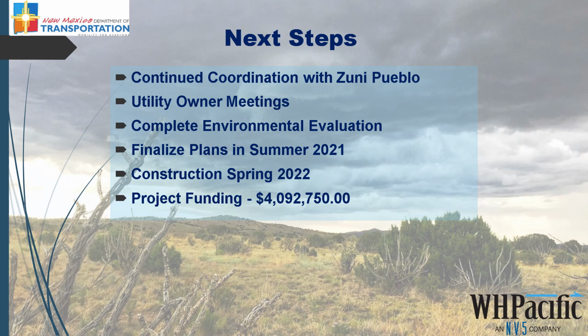So the next steps include continued coordination with Zuni Pueblo, continuing to meet with utility owners, completing the environmental evaluation, and finalizing the construction plans in summer of 2021, with construction actually beginning in spring of 2022. The project funding currently is $4,092,750.